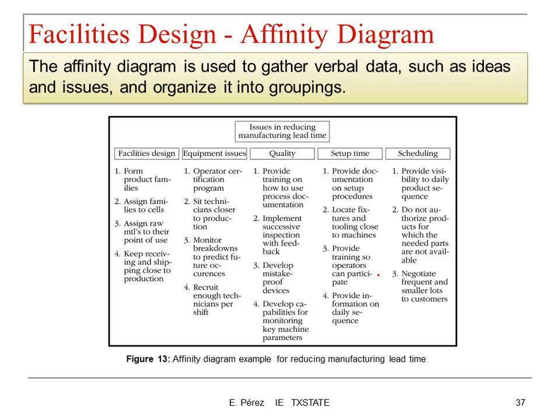If you're trying to build an engine and you have multiple components coming to assemble this engine, some of them might arrive in 2 days, some of them might arrive in a week, some of them might arrive in a month. So that time frame is the lead time for each one of the components. The time that you're going to wait to get that assembly or component into that final assembly.